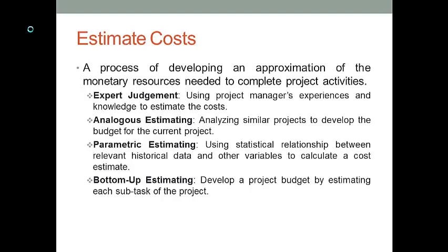You can also use something called the parametric estimation. When you use this method, you want to estimate the current project cost from a statistical perspective. Let's say you summarize the previous 5 projects and get the average of the 5 project cost. The average value will be your estimated cost for the current project.